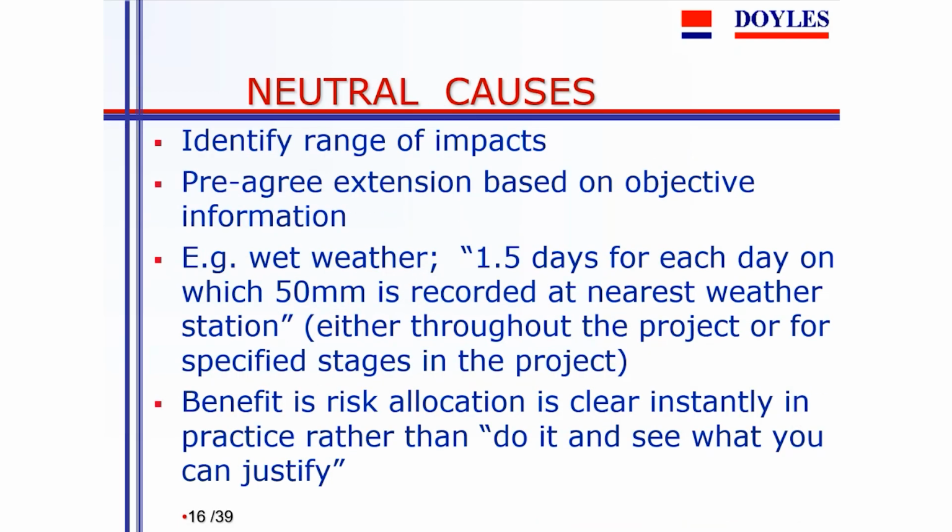you've got to be careful to identify the causes. And the cause of a delay, if it's on the contractor's side, say his equipment breaks down or his blokes don't turn up after the Christmas party or something, or somehow they make a mistake, then that's pretty okay, and usually you don't get extensions for it. But there's a lot of neutral clauses, that is, clauses that are not the fault of the contractor or the principal. So the issue is you've got to watch those as to who they're allocated to.